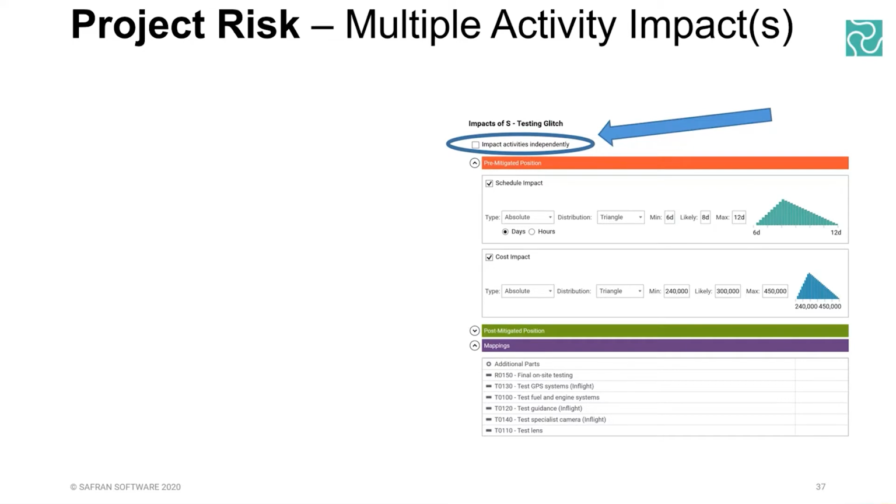So this was right at the top, and you might have skipped over it, but there's a little toggle here that can have quite big ramifications on your modeling in terms of the correlation factor. If you have multiple activities mapped to this, or cost elements as another one, how they behave can be toggled here.